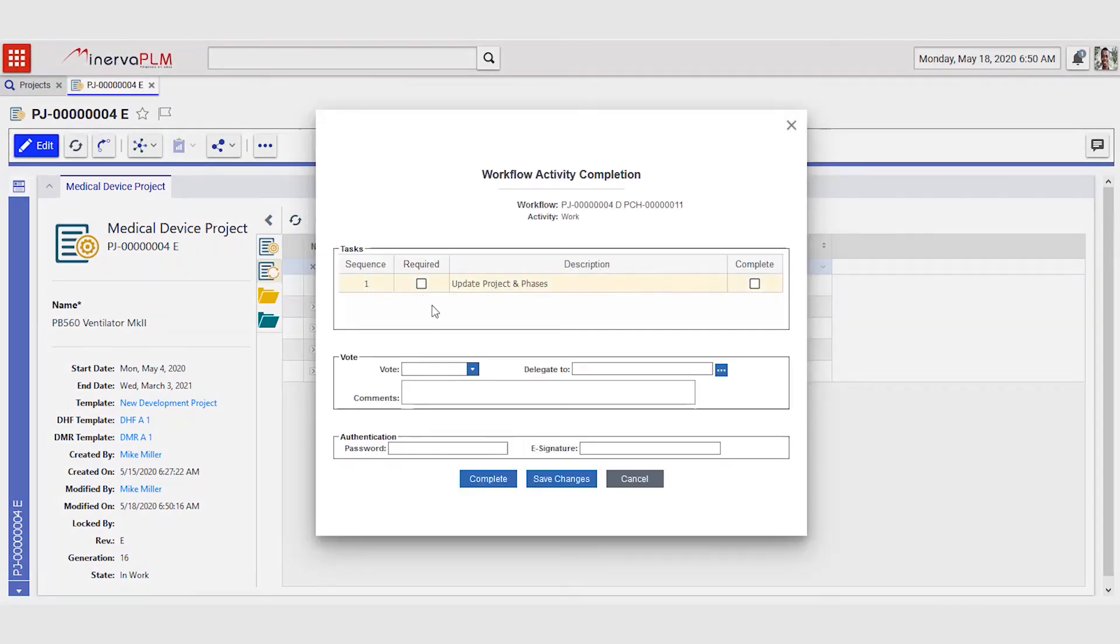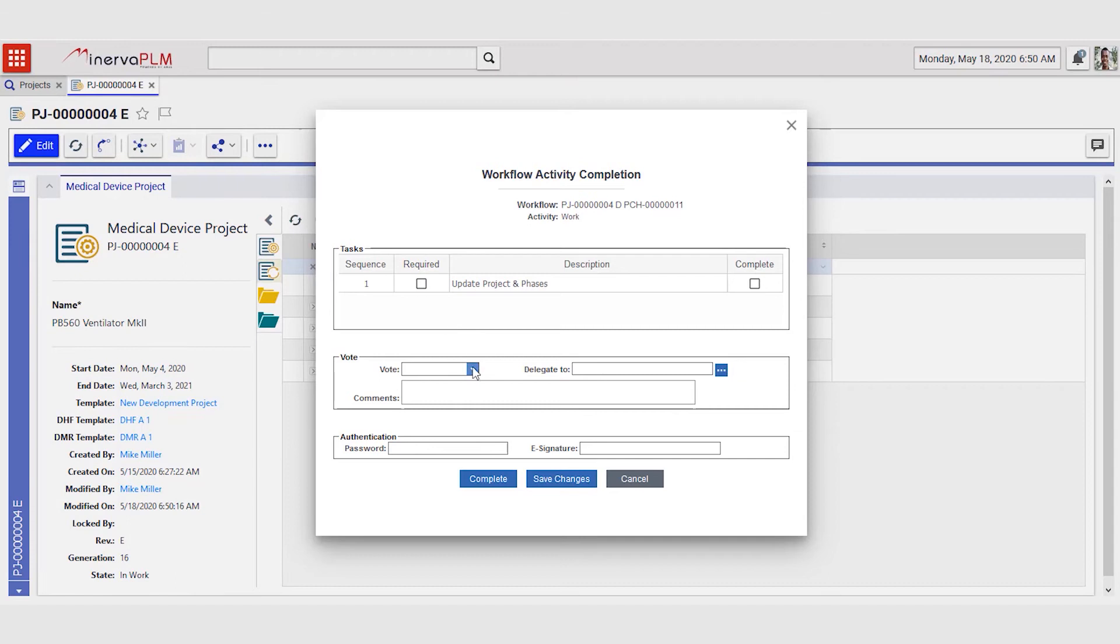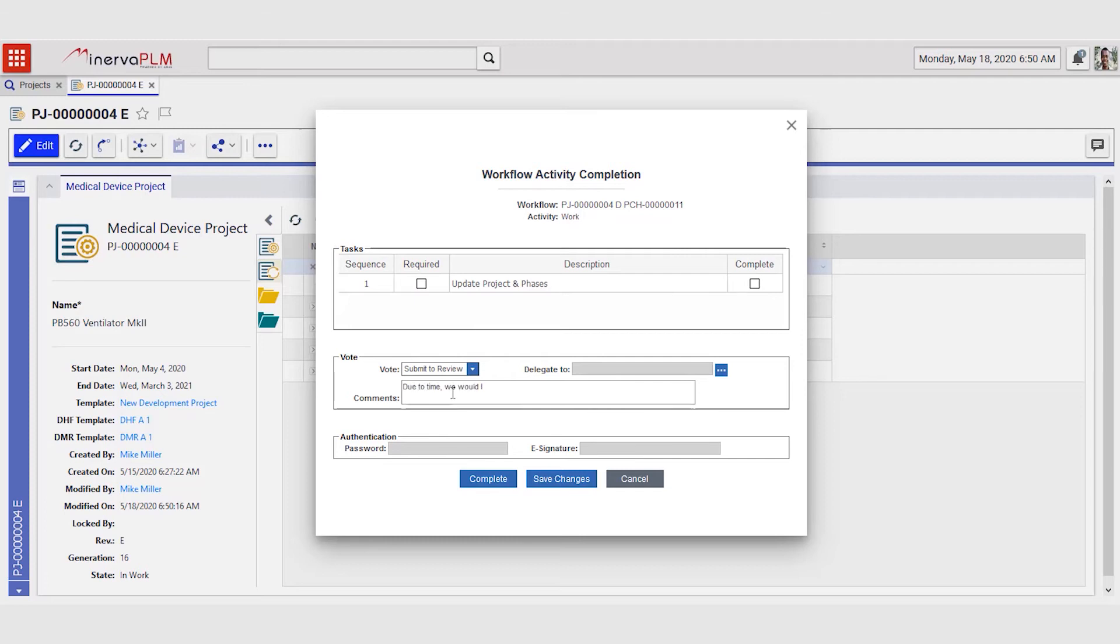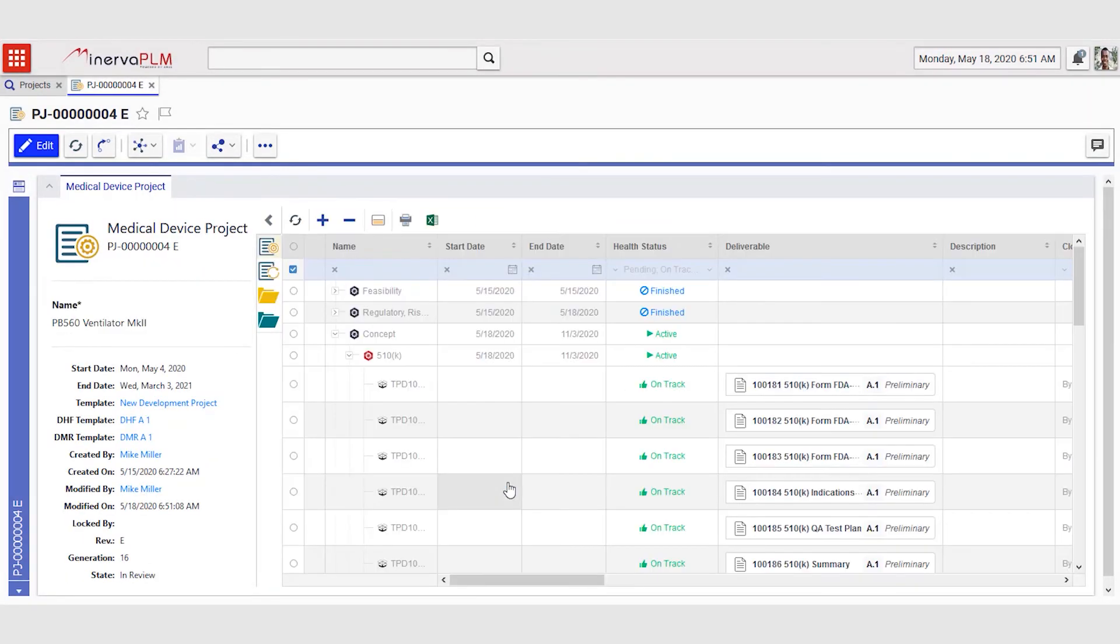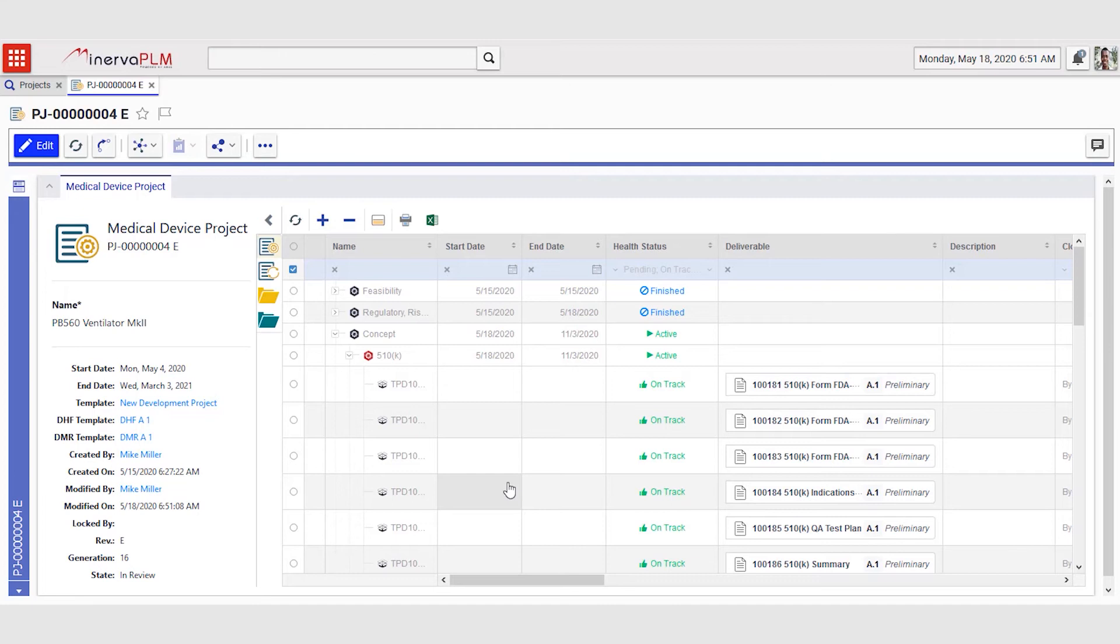Mike sends this for review and writes a comment: 'due to time we would like to move the patent filing to next phase.' When he clicks complete, notifications are sent out to the entire steering group that there is now a change request from Mike to move this deliverable. They can now assess this change and come with their input whether or not they want to approve this change. In the meanwhile, all Mike can do is wait.